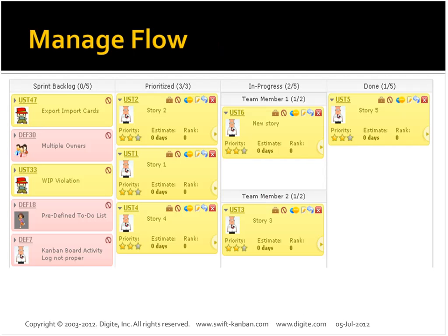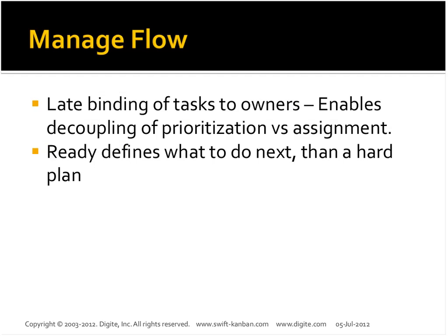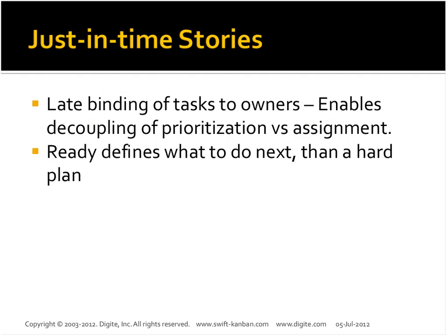So there's a whole pull mechanism to it, rather than the push mechanism where each person is assigned a set of stories that he needs to work on, and then he finishes up and comes back again asking the project manager or the product owner, what do I take up next. That implicitly builds up a queue for each team member. In a pull system, they can go and pull cards and take them through.